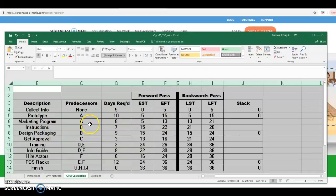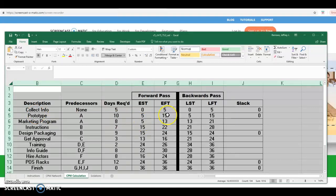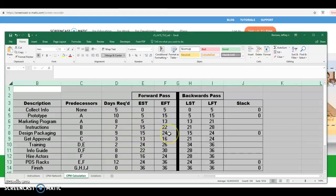Instructions and design packaging both have a predecessor of B, so you can look at activity B — B finishes on day 15. So both of these activities can start on day 15. Seven-day duration finishes on day 22; nine-day duration finishes on day 24.